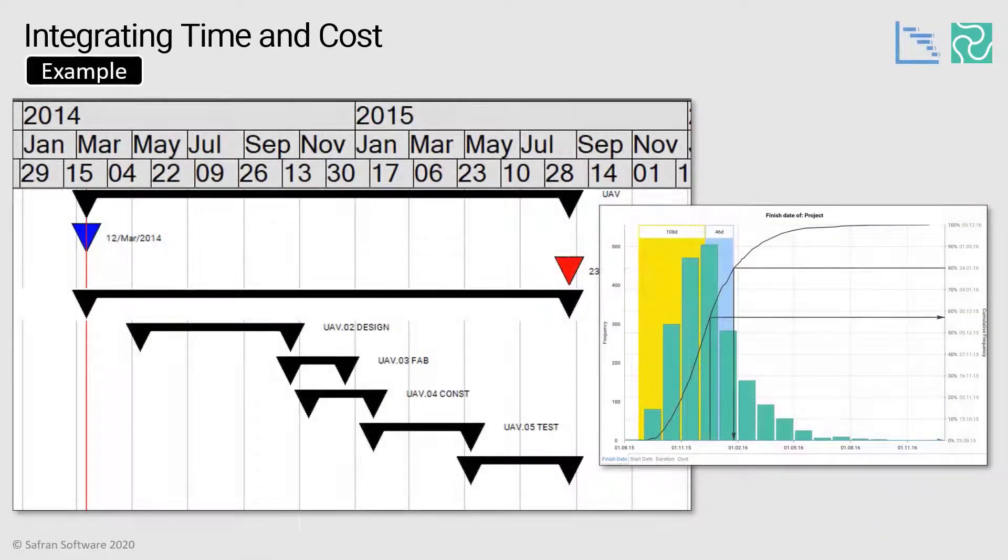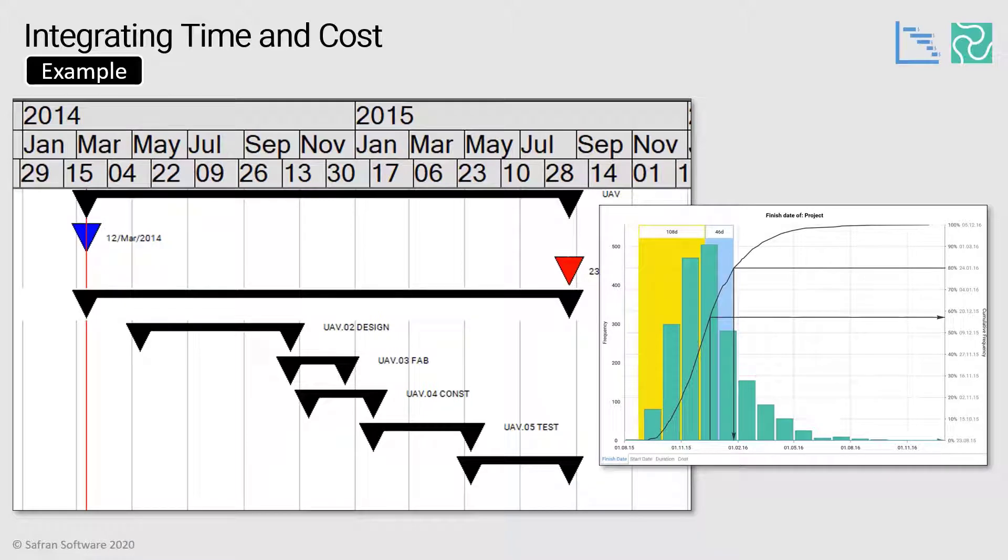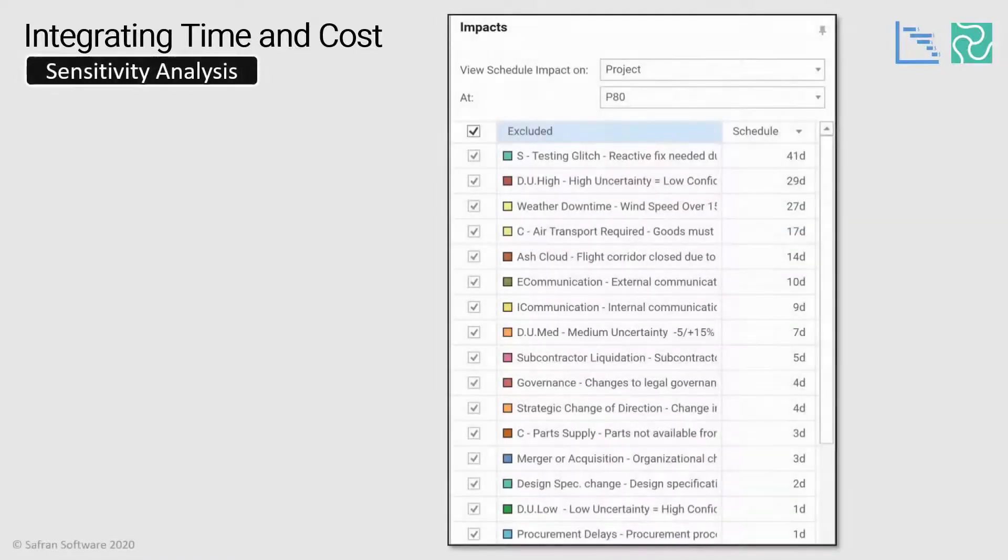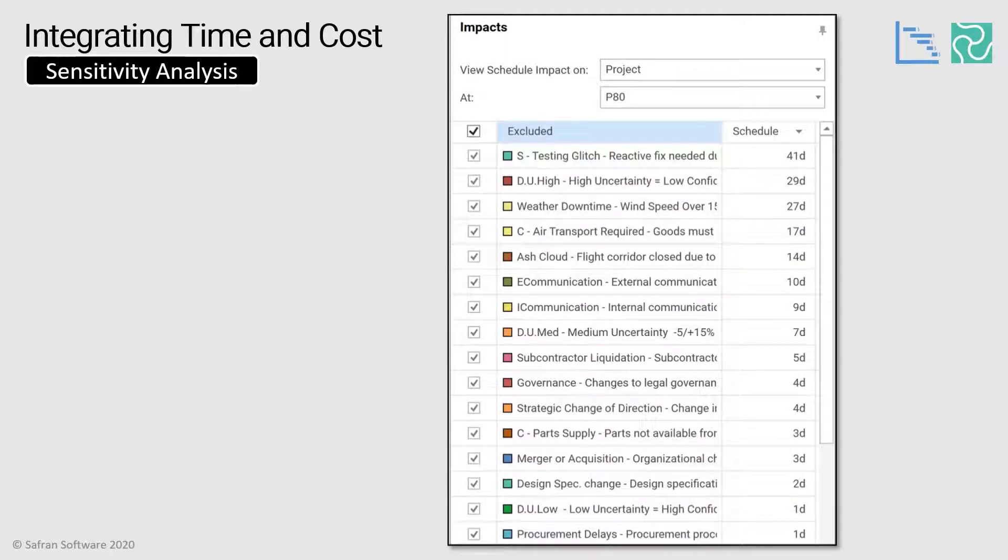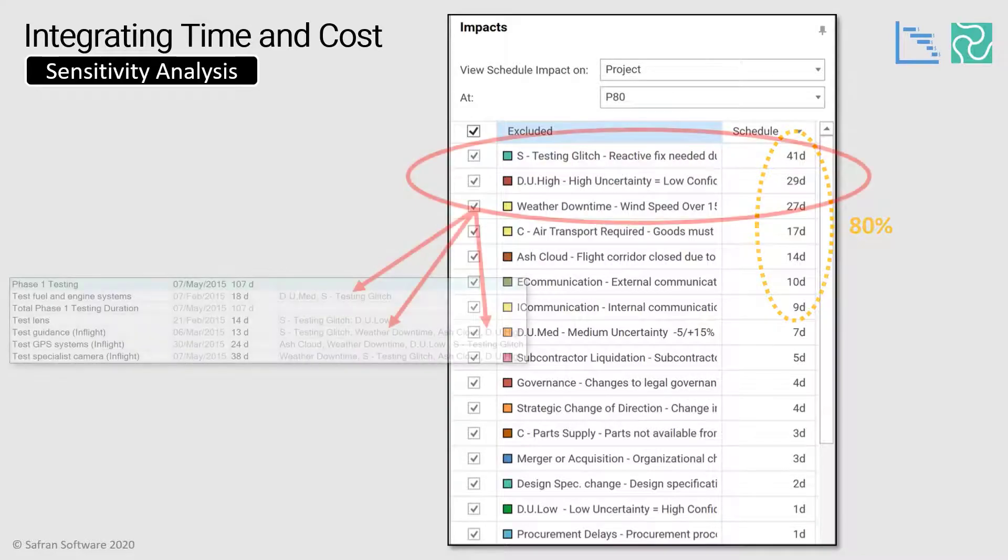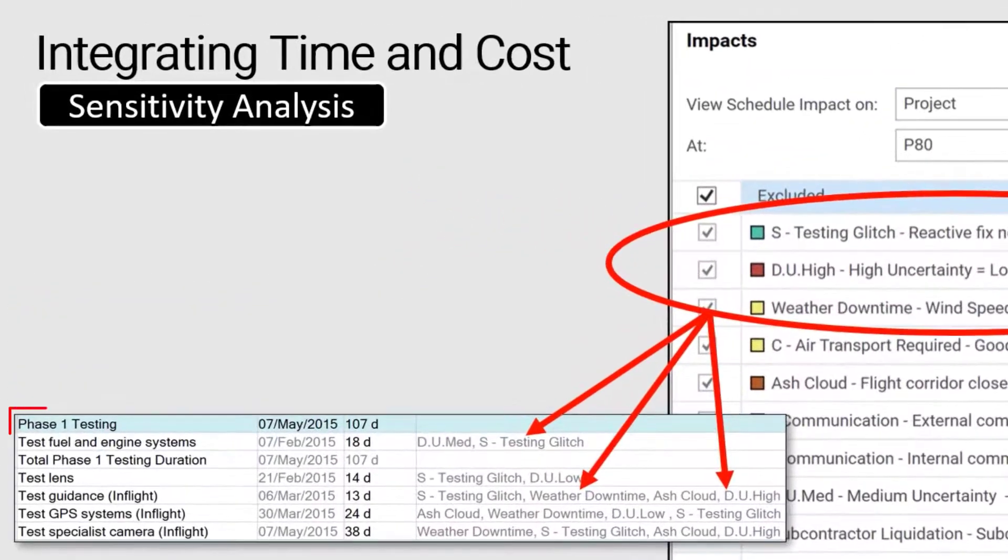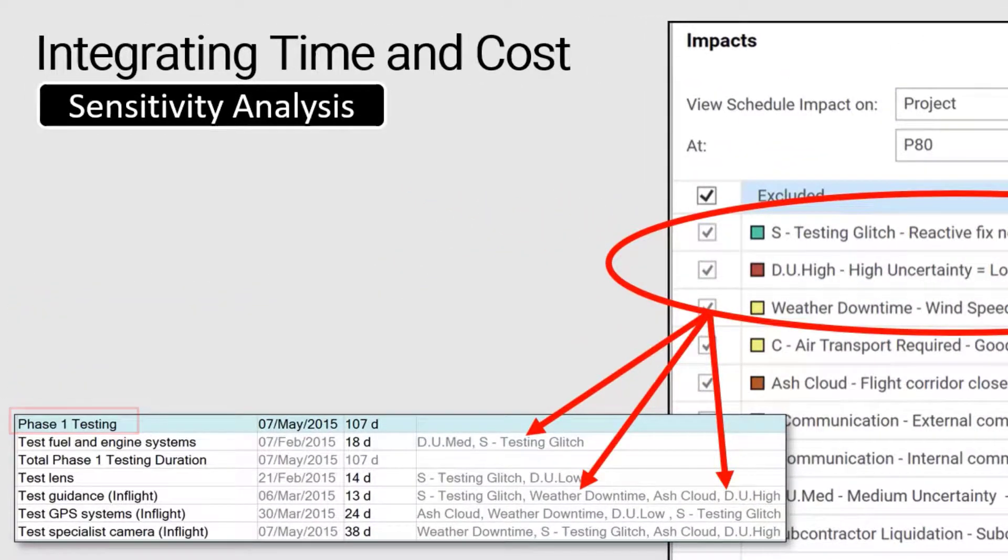So in this example, we have a fictional project where we're going to design, fabricate, construct and test fly some unmanned aerial flying vehicles or drones if you prefer. And in this scenario, we've already run the Monte Carlo simulation. The first thing we might want to do is look at the sensitivity analysis report and we notice that 80% of all the scheduled impact is actually found in just the top seven risks. And then the top three are all attributed to the testing phase of the project.